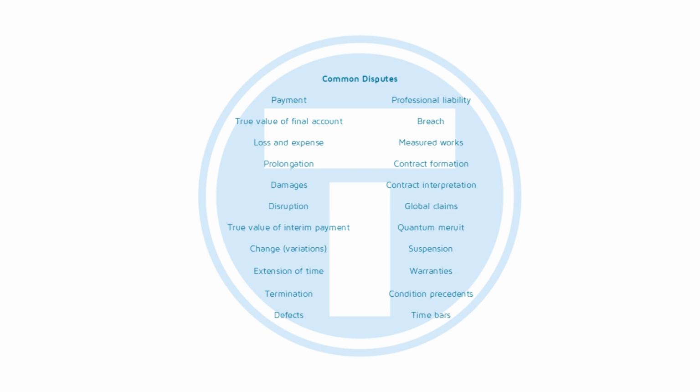Defects. Disputes referring to flaws in design, materials, workmanship, and overall system failures. Professional liability. Disputes over the level of the duty of care owed, whether breach of that duty occurred, that the party suffered damages or loss, and that such damages or loss were as a direct result of this negligence. Breach. Where one party fails to fulfill their contractual agreements and the other party suffers a financial loss as a result of this non-performance, substandard performance, or delay in performance.